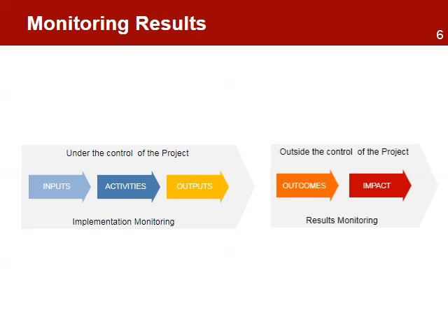There is a gap between what is in control of the project and what is outside the control of the project. And that is the reason why there is a need to monitor results. If the outputs the project is delivering are not creating results, then the project manager needs to reevaluate the project, find ways to reformulate its implementation strategy, and make the necessary changes to achieve the targets identified in the results framework.